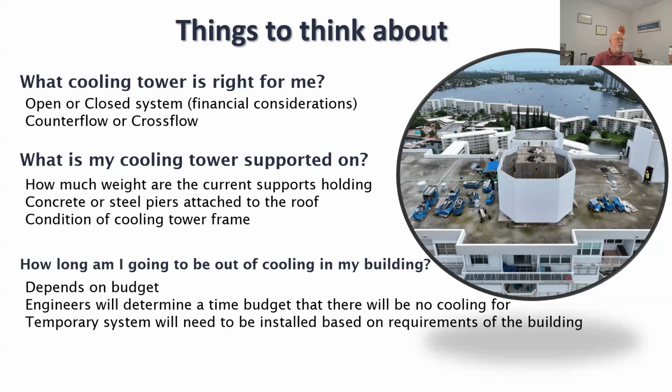And some of it as well, what tower is right for me? You also need to make decisions at this point in time. Do I need to replace the pumps? It's always my recommendation that if the pumps are the same age as the tower, probably a good time. We're doing the work. Last thing you want to have happen is you had a new cooling tower, and 6 months later, your old pump failed.